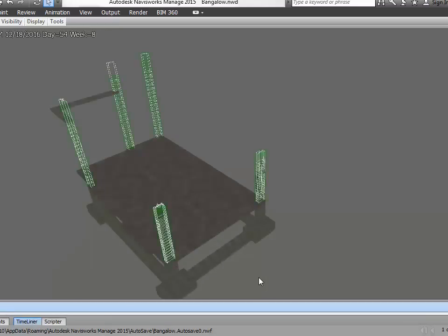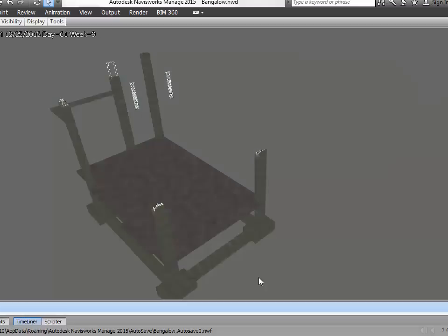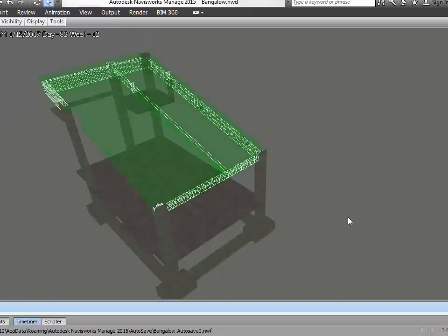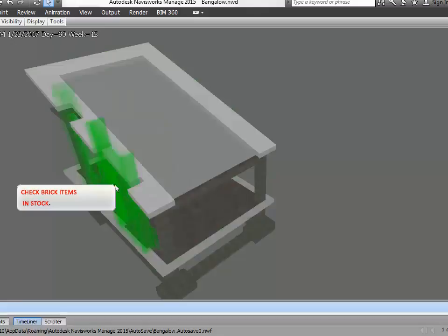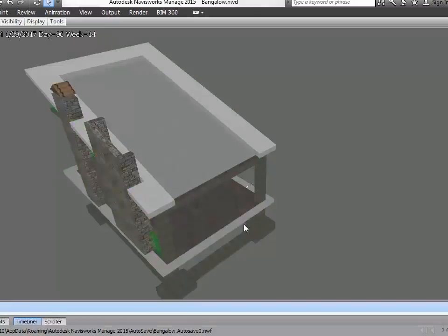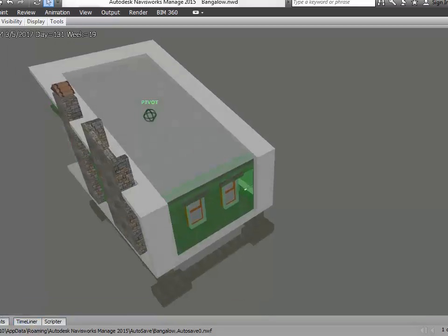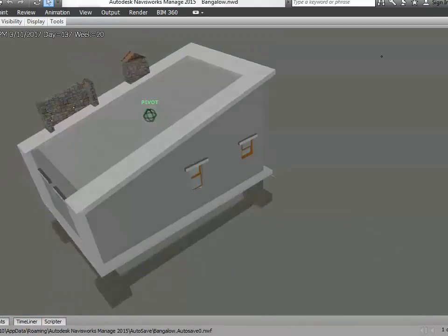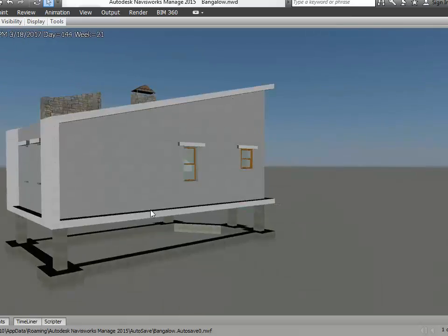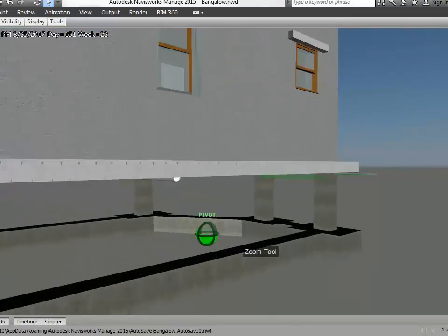4D planning ensures this full coordination. For example, every single planning mistake for any single element is tracked before construction. Supply of materials can also be managed in the right quantities at the right time when needed. In addition, using direct installers at the right time has also become a manageable operation in this 5D approach. Coordinating trade installers like plastering, woodwork, paint and others reduces cost drastically. Also, clashes between different trades are eliminated.